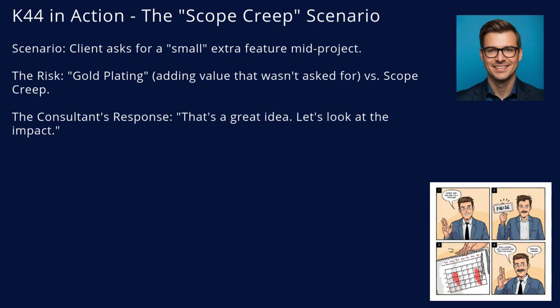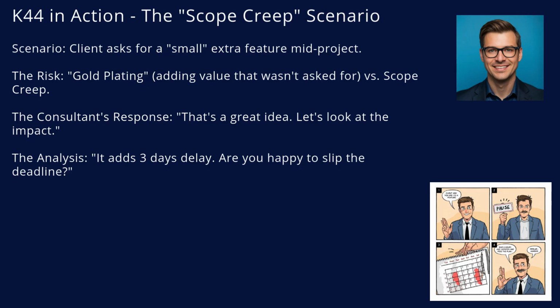Your response should be professional. "That sounds like a great idea that would add value. Let's raise a change request and look at the impact." You do the analysis and return to the client. "To add this dashboard, we will need to pause development on the mobile app for 3 days. This means the go-live date will slip from Friday to next Wednesday. Are you happy to authorize that delay?"